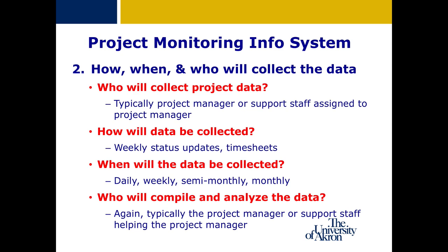Typically, you as the project manager will be expected to collect the project data. I've had instances where I was able to bring in someone to help, though this is usually only available for very large projects with a significant budget. I have also been able to use project tools like Primavera and Microsoft Project Server to help collect some of this data automatically, though there are significant licensing costs associated with these tools.